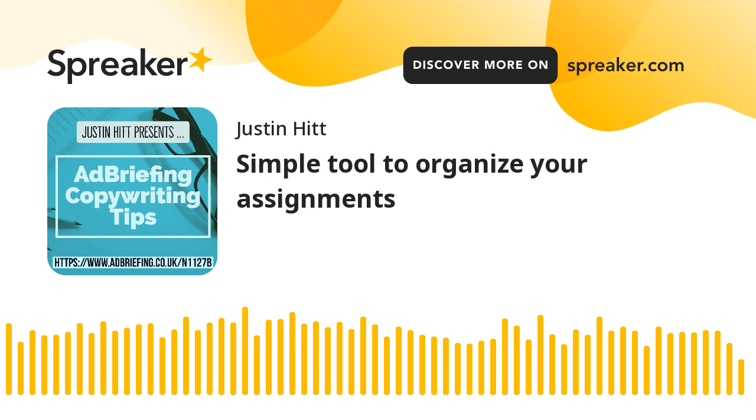Let me explain why that's important. Let's say you're writing a sales letter for a client. You've established up front all the characteristics of what goes into the sales letter, and you've also identified up front who signs off on the work. Now, why is that important? If you don't figure out who signs off on the work up front, you're going to pass that sales letter over when it's finished, and it won't be finished because 6 or 7 people are going to have inputs.